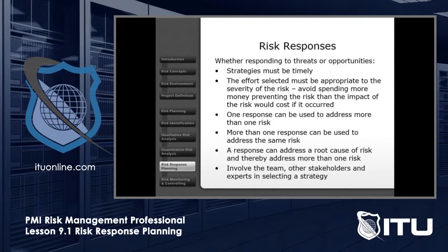So risk responses, whether responding to threats or opportunities, we want to make sure that they're timely, something that we can invoke in enough time to actually manage that risk appropriately. The effort selected must be appropriate for the severity of the risk. Again, we don't want to spend more money preventing the risk than the impact would have cost if it occurred. So you want to evaluate that. Keep in mind, as I just mentioned, one response may be used to address more than one risk, and that's why we like to get to root cause. More than one response can be used to address the same risk. Again, you may have to do multiple responses. A response can address a root cause and thereby address more than one risk. Again, be efficient in how you're doing things.